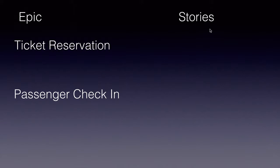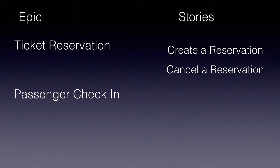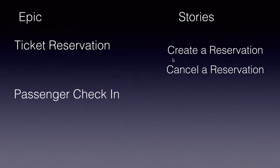Once we have these two EPICs, all the requirements can be put under STORIES under these two EPICs. For example, the ticket reservation EPIC will have a 'create a reservation' user story, as well as 'cancel a reservation' and many more.